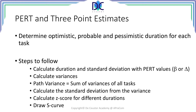PERT and three-point estimate. First, we identify the optimistic, probable, and pessimistic duration of each task. There are some simple steps to follow. First of all, with that information, we can calculate the duration and the standard deviation of every activity.